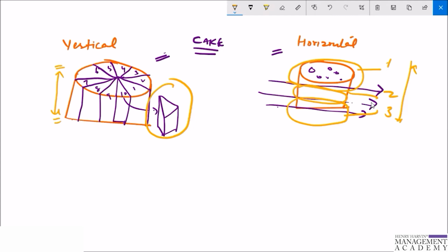And another reason is that if we do the horizontal slicing, it cannot be prioritized, because how can a product owner prioritize a backlog if it consists of horizontal slices? None of the items deliver business value or working software on their own. A product owner will be unable to prioritize the work.